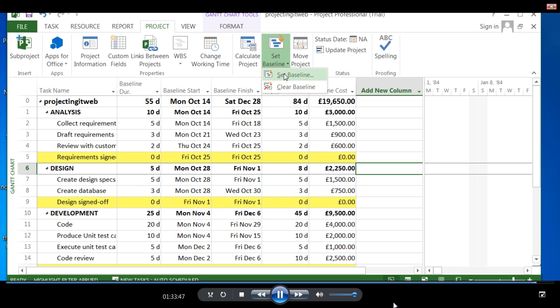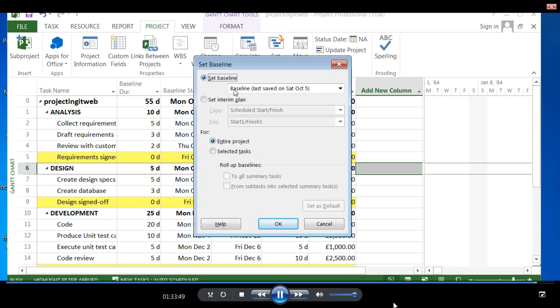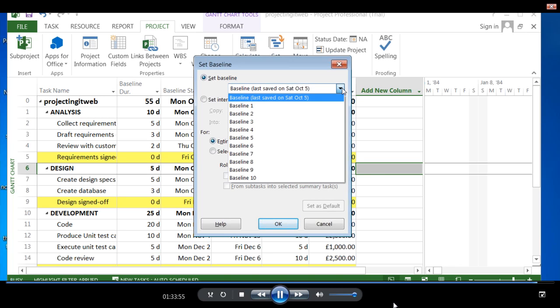How do you retain all baselines? Before you make a change, what you do is, you should save your current baseline into next number available. The reason to do this workaround, Microsoft only uses information within baseline.